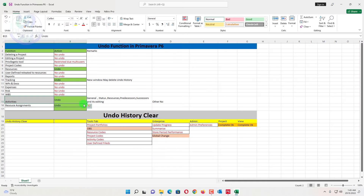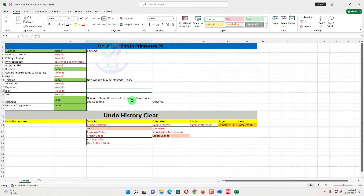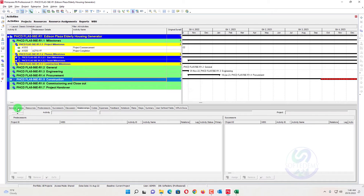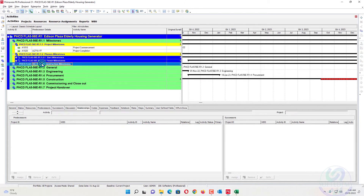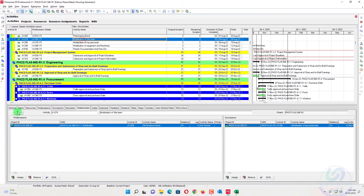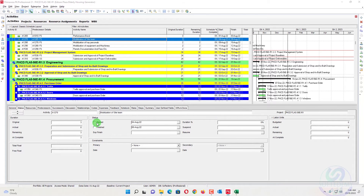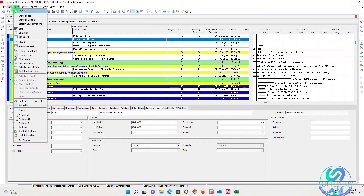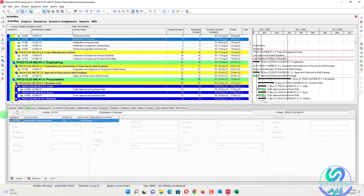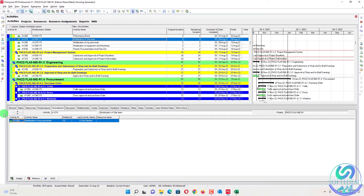For the details section below activities, undo can only work for the General, Status, Resources, Predecessor, and Successor tabs. For example, I will update the activity status — I will start an activity and put 10%. You can undo this one. When you press undo, the percentage has been removed. When you undo again, the start option will also be undone. So General, Status, Resources, Predecessor, Successor, and Relationships are undoable — their editing and removal are also editable.